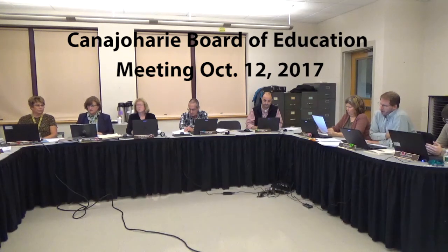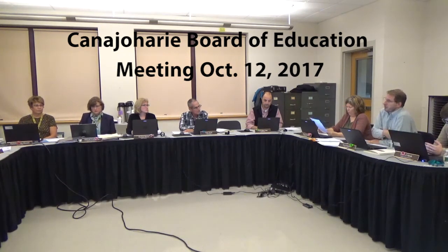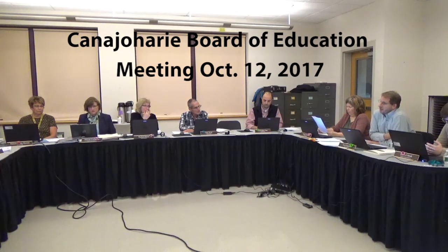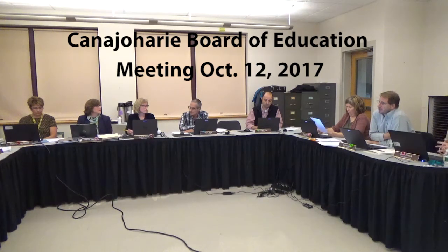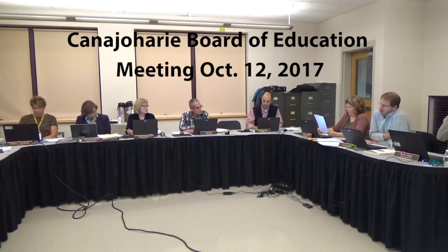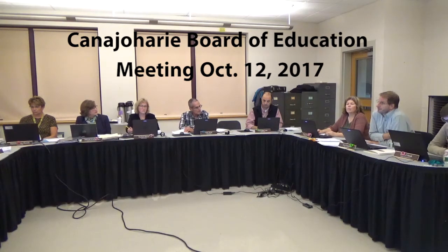Okay, but what about your example of job ads, what if we anticipate we're going to run job ads in March? Is that showing up in the encumbered column or not? Yes, an estimate is put in there for a year. So if something's budgeted and anticipated, it's showing up as encumbered, even though we could still decide not to do it. Yes.